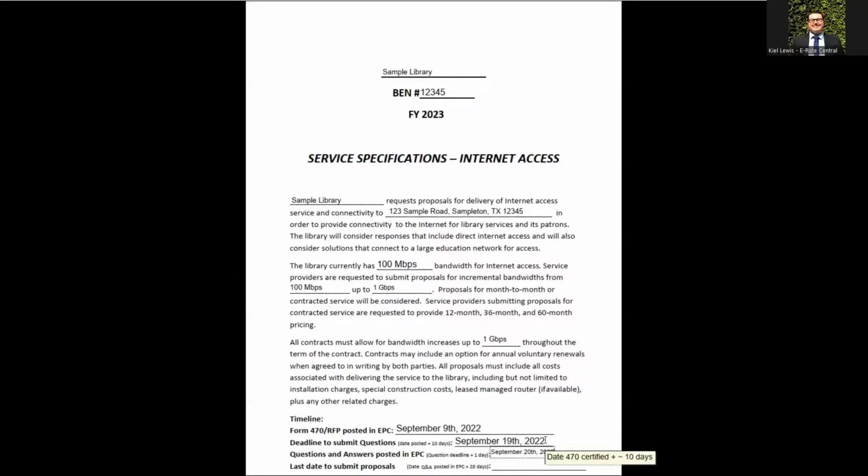So September 19th is a Monday, September 20th is a Tuesday, but if you were to have the question and answer deadline to submit questions on the preceding Friday, September 16th, you may want to consider making the Q&A posted in EPC date the following Monday, if that will be the next day that you're able to post that.